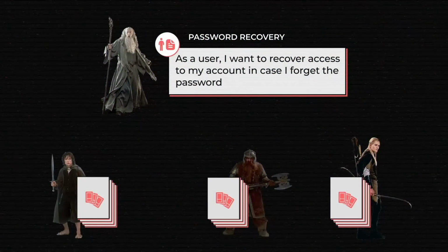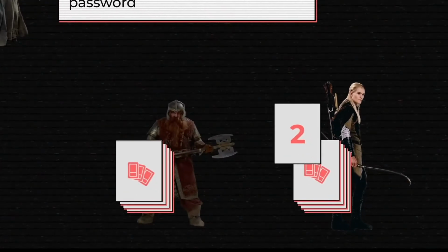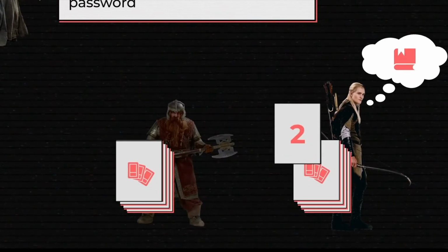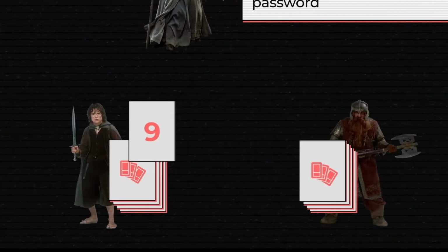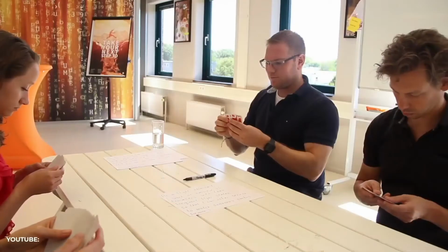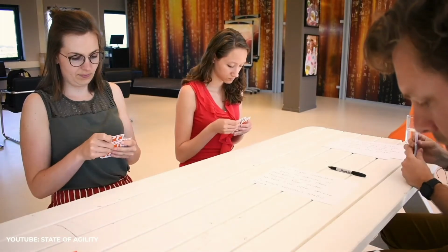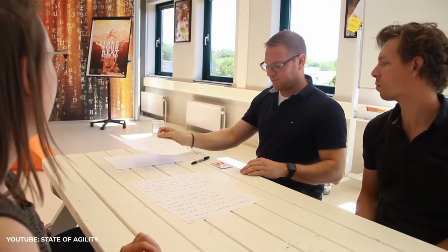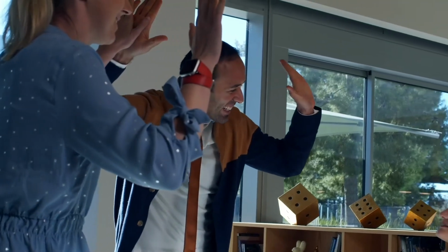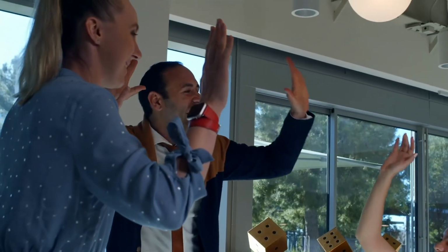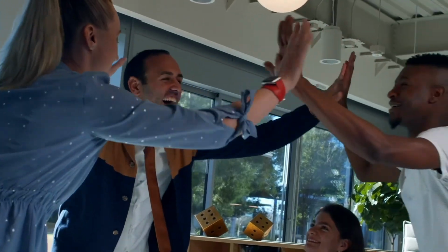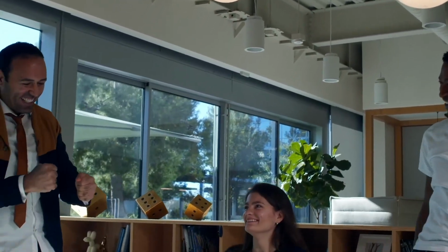Say someone is confident a user story deserves just 2 story points. Perhaps they know of a library that can automate the task. Or someone else that assigned it 9 points sees hidden risks. Planning poker allows team members to come up with interesting insights and be more realistic about task complexity. Planning poker is most effective in smaller, targeted teams that are already familiar with a project and each other. And it allows you to estimate how productive the team will be, or its velocity.